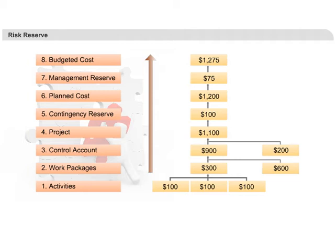Costs are managed at the control account level. When I say cost is managed at the control account level, it means how much was planned for work packages within that control account, how much is actually spent, and so on, are accounted for at that level. As you can see, first the cost of all activities add up to the cost of the work packages, and work packages cost add up to the control account cost.